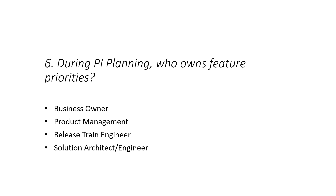During PI planning, who owns feature priorities? The options are: business owner, product management, release train engineer, or solution architect/engineer. Just as in sprint planning we have a product owner who owns priorities for a sprint, during PI planning there can be more than one product owner, so it is mainly product management who owns feature priorities. The right answer is product management.